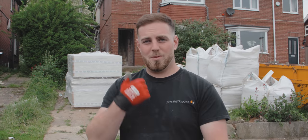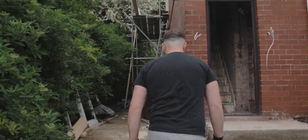We've got the roof on, we've got the floor fixed down, we've got the first fix electrics done, including the extension, we've got the first fix plumbing all complete. We've got dry liners starting, we've got the scaffolding coming down. It's all been happening over this past 2 weeks. So this is where we're gonna start. Let's go and have a look.